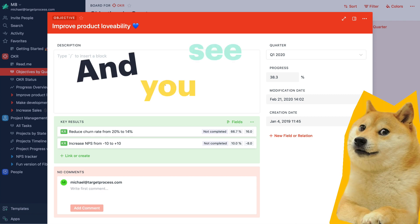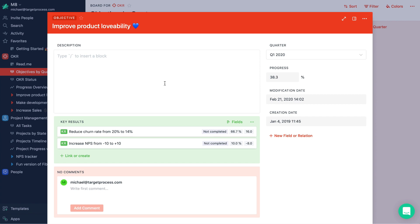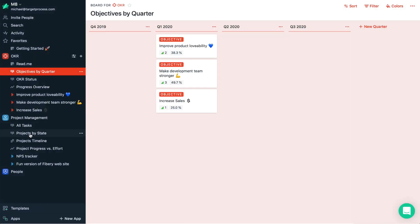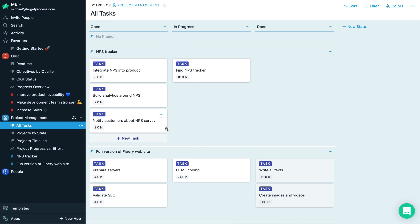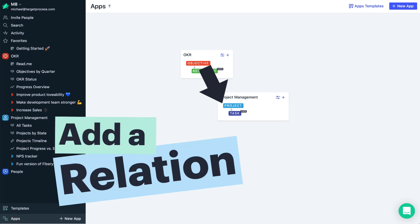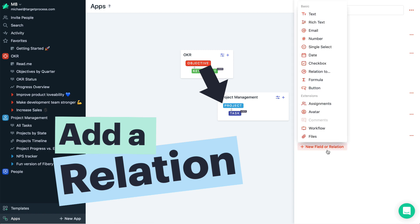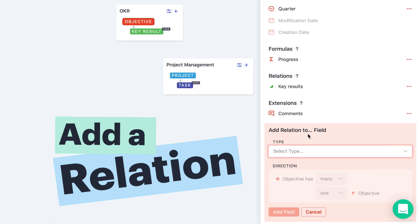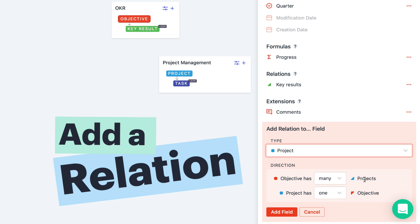And you see, you don't kind of see what projects you implement to meet this objective. And you can see a list of your projects with all the tasks, but you kind of don't see what objectives this project belongs to. Let's fix this problem in Fibery — we will connect our objective and project. So we add a new relation here between objective and a project, and objective will have many projects.